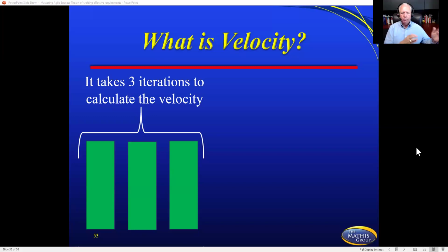Now, what does that mean? That means that after I've averaged how many features or story points or user stories, however we're counting these, out of 3 different iterations, I'm now able to start making some projections. So when people say, well, I can't tell you when the project will be done, that's not totally true. With velocity, I can start giving them a range. I can't necessarily say it's going to be done June 15th, but I can say somewhere between the 10th of June and the 25th of June, I think we're going to be finished, because I'm looking at the pot of features and user stories in the product backlog, and I'm doing my velocity as we go, and I can make some projections.